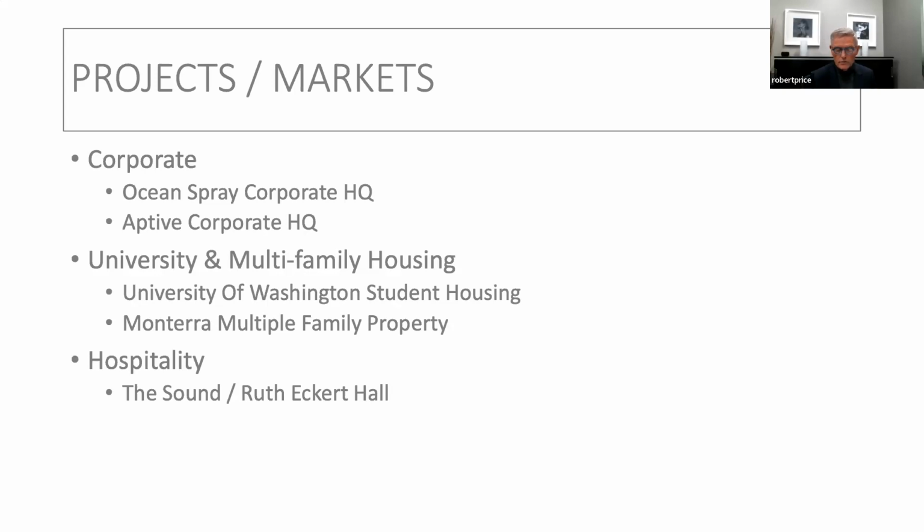So they would literally say, we want the fantasy lounge first. We would load all of the product on 1 truck or 2 trucks just for the fantasy lounge and have it delivered like Monday at 9 a.m. What it did is it allowed the dealer to completely eliminate any need for a warehouse because we were bringing it right into the stadium. They were unloading it and the trucks would leave, and then they would do the install. And then we would bring in the next club area and be able to do that.